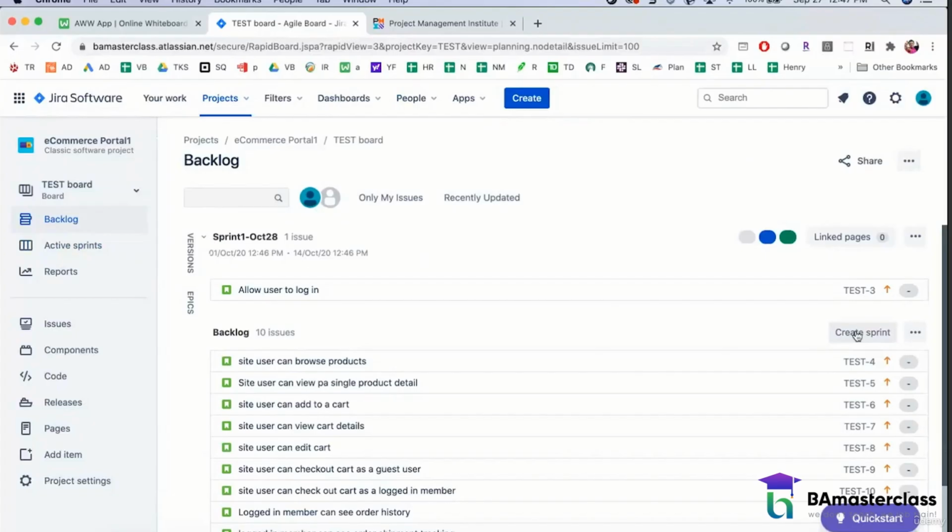Yeah, so it's basically the Scrum Master and the team members who define what would be a sprint cycle. Different companies do that differently, right? Yesterday I went through different scenarios. You would have a monthly release and your 2 week sprints, so in a release you'll have two sprints. Another scenario was a monthly release where each sprint is 1 week long, so you'll have four sprints in a release. Another scenario is one release, one sprint, 3 weeks long. So it's the Scrum Master and some of the other members who define what our Agile framework structure would be, and you work accordingly.